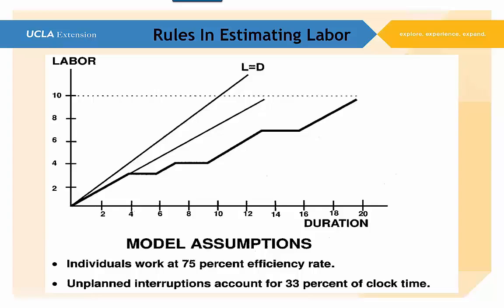Some companies have actual standards. They say when you're doing scheduling, estimate your labor at 75% efficient or 80% efficient, 90% efficient. I hope not 60 or anything lower than that. The standards over a number of years, they used to announce the standards on a monthly basis, what the productivity of the workforce of the United States was for the previous month. And we used to run for a number of years around 77%, 75, 78%. And then in the early 90s, it really improved. It actually went up into the 80s and low 80s, 85, and it was getting a lot better. And then we had a couple of those crashes, and that's when everything really started to fall apart.